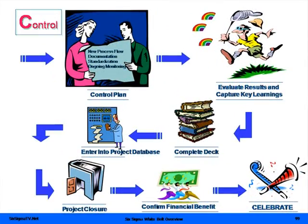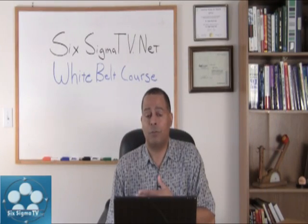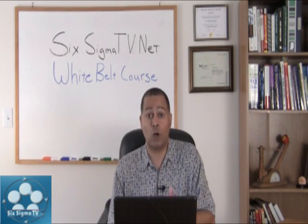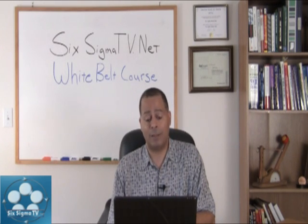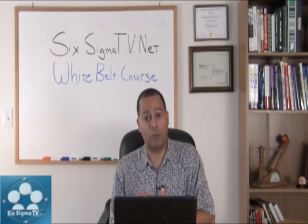So you have your new processes documented, you evaluate the results of your learnings and your pilot, you complete any standard operating procedures, you publish those, you confirm your financial benefits, you run that by your division financial officer to validate your hard savings and soft savings from the project. That way they'll know that it's in the books, it's on the general ledger, and that's what you want with your hard savings.